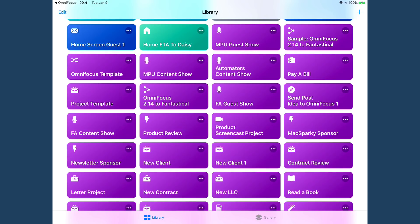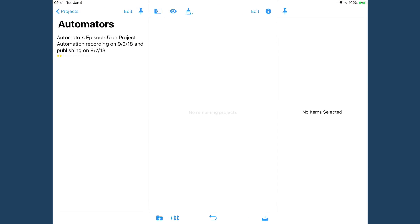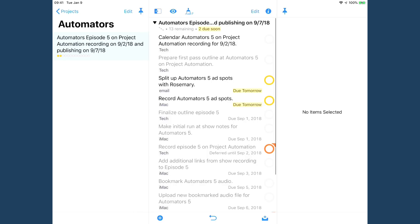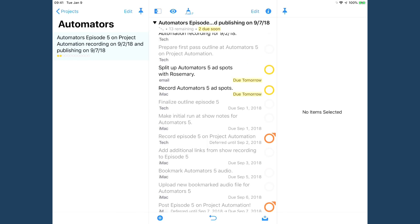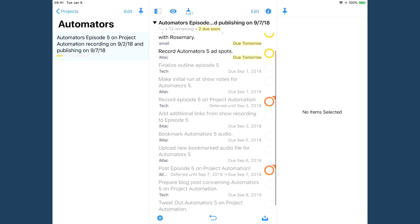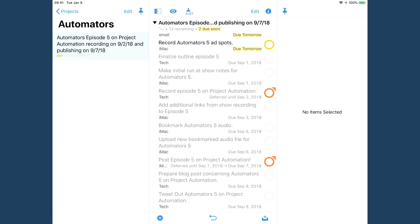So let's go see that. I'm going to tap over to OmniFocus. And you can see in automators, I have this whole project that's created with these relative due dates. Like because we're recording in a couple of days, it's already giving me due dates for that early preparation stuff, like doing the ad spots and preparing the outline. And all this stuff is relative to the dates I typed in. Sending out the tweet, I said I'd publish a show on the 7th. So the tweets are going to be due on September 8th. So it's all done. If I go into my calendar, I've got calendar events for it as well.